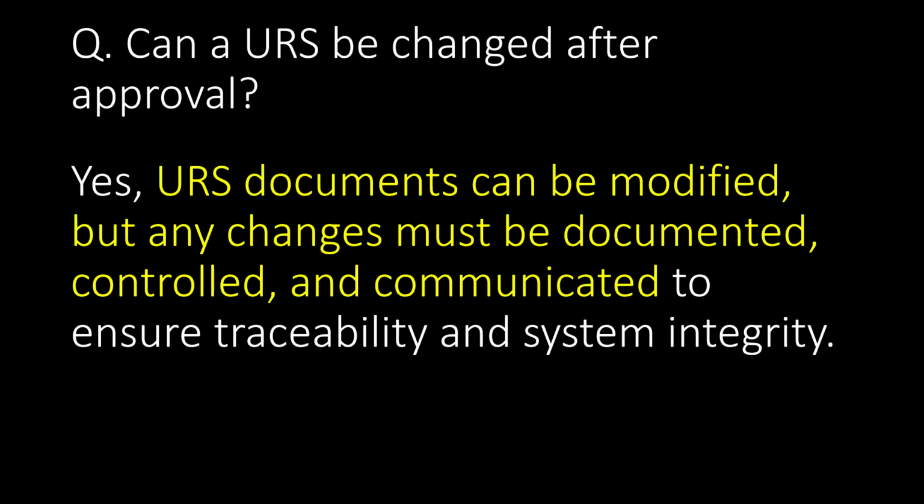Can a URS be changed after approval? Direct answer is yes. URS documents can be modified, but any changes must be documented, controlled, and communicated to ensure traceability and system integrity.